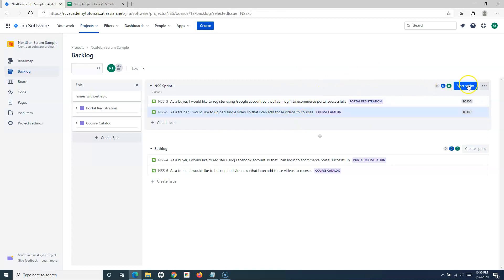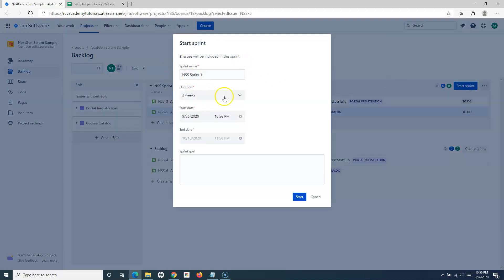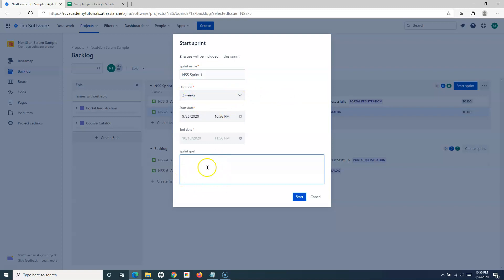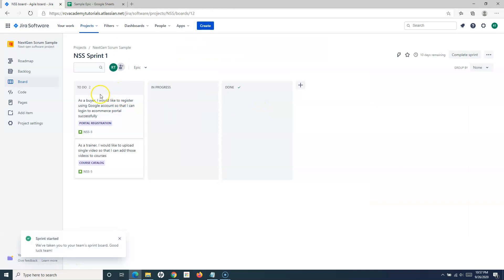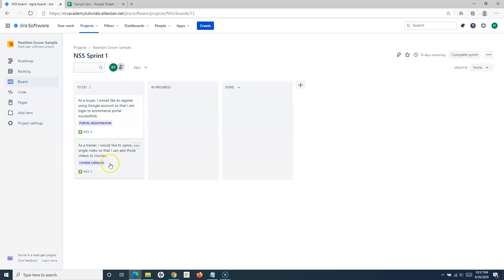Once you've pulled the work items or stories into the sprint, the next step is to start the sprint. In the next-gen project, you'll find similar options: sprint name, duration defaulting to two weeks, and a sprint goal field where you specify the business value to be achieved. Start the sprint and the work items selected as part of the sprint backlog will appear on the board — those are the requirements that need to be completed within the sprint.